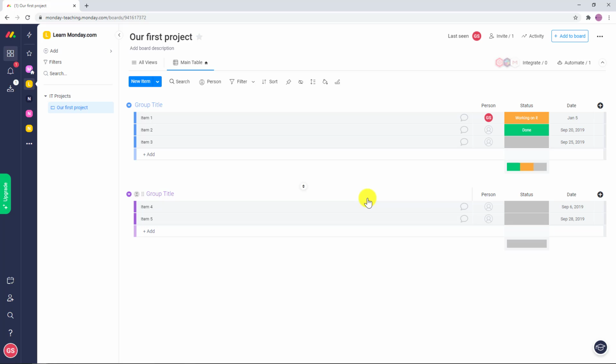And here's how this works. So these are the standard items that Monday generated for us. We have 5 items grouped into 2 groups. And let's say that our project is to redesign our website. Then what I will do is I'll use the groups here in order to make the different phases of the projects, for example, analysis, right? Then we have, I'll keep it really simple, execution,